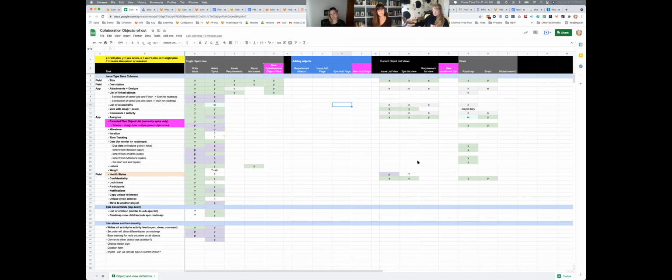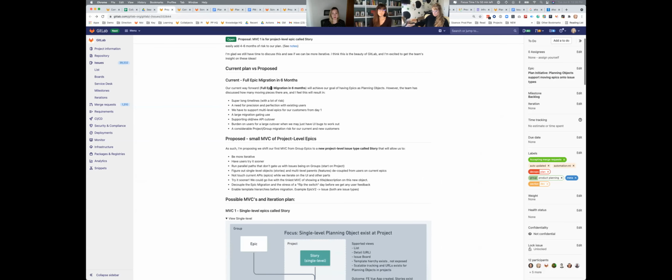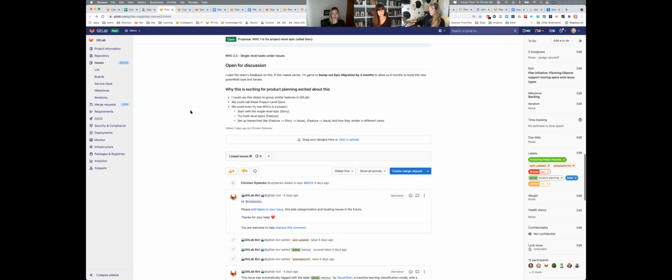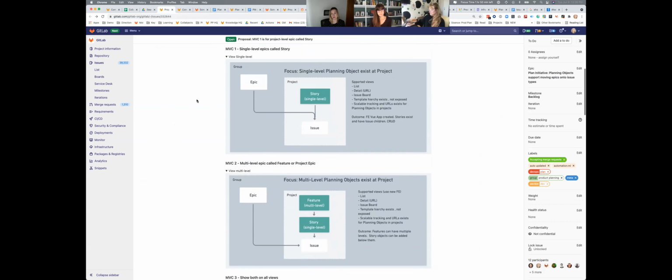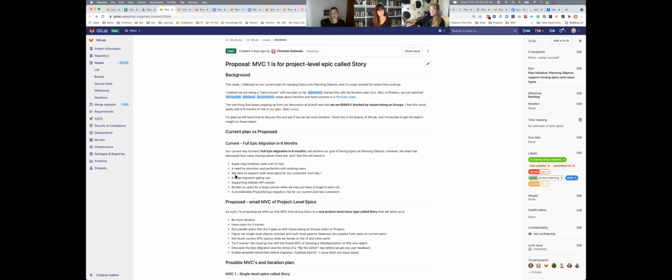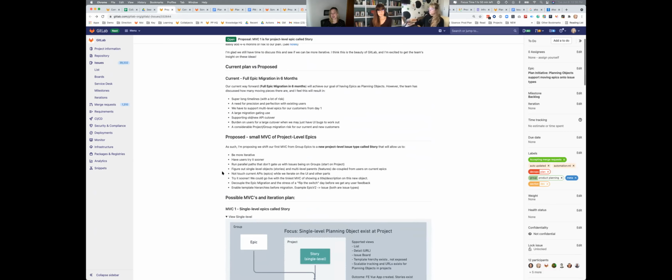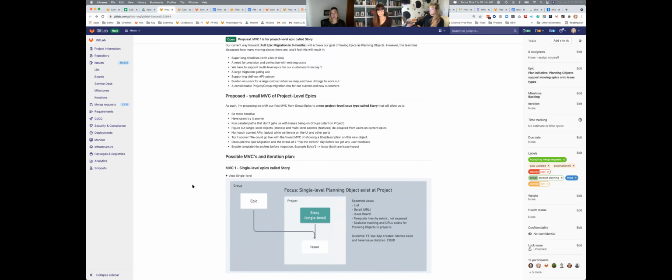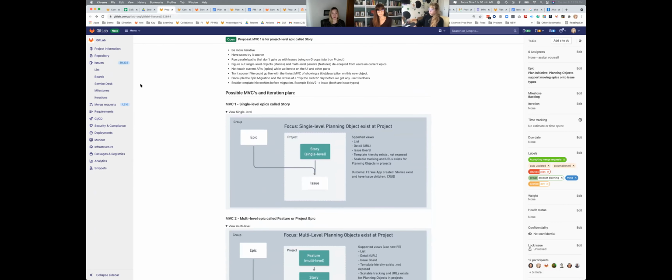What do you mean 3 months? Sorry, what is the extra 3 months for? So initially I had said we needed to do all of epics. The initial proposal was a full epic migration within 6 months because I bumped all of our category maturities by 6 months. But I've bumped it out another 3 months. I'm going to do the MR after I hear from engineering, but another 3 months will give us 9 months total for getting epics over. So 6 months to figure out basically project level epics, and then another 3 months for the team to take what we've learned and do a migration of our existing users, which will be heavy.